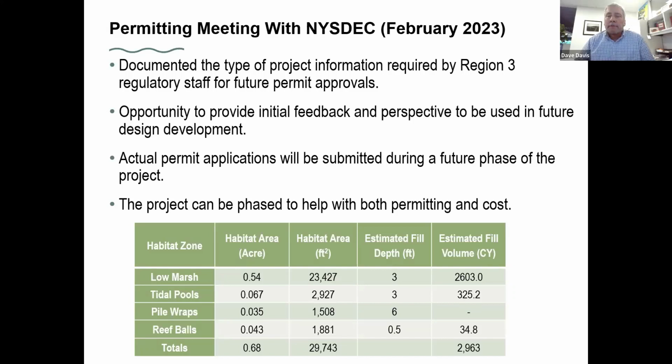And a lot of what the discussion centered around for the in-water work was what's shown here in this table, and that's the idea of creating habitat versus what might be lost, either through fill, through the sheet piles, or through sediment and infilling. So really looking at that trade-off, habitat versus construction impacts. DEC is very sensitive to adding structures into the Hudson River, and so you have to make a really strong case of the value of that construction.